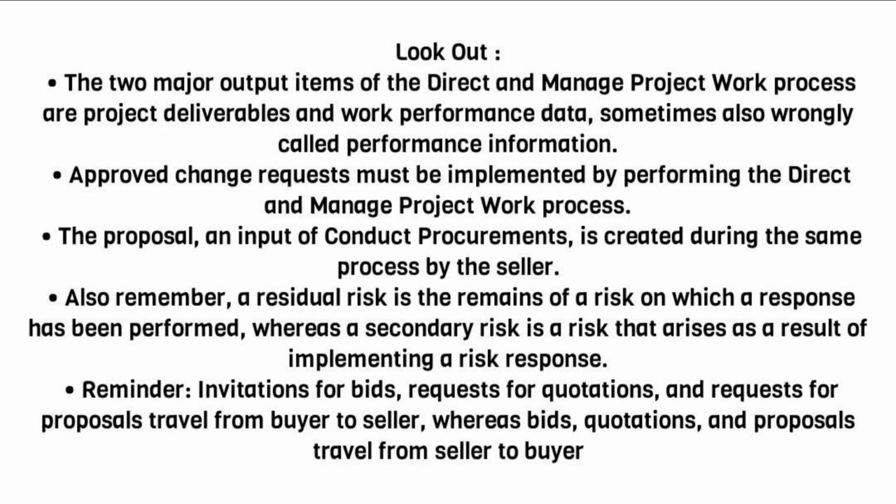Also remember, a residual risk is the remains of a risk on which a response has been performed, whereas a secondary risk is a risk that arises as a result of implementing a risk response. Reminder: invitations for bids, requests for quotations, and requests for proposals travel from buyer to seller, whereas bids, quotations, and proposals travel from seller to buyer.